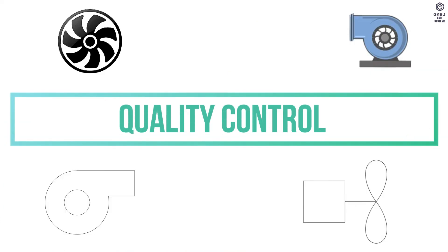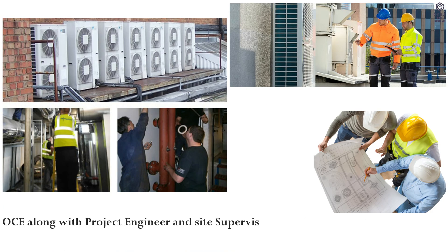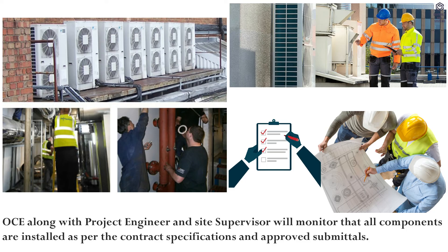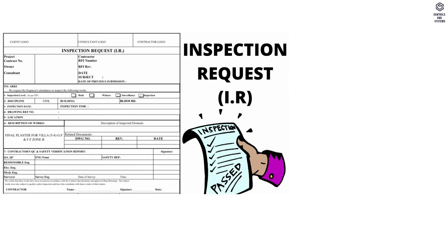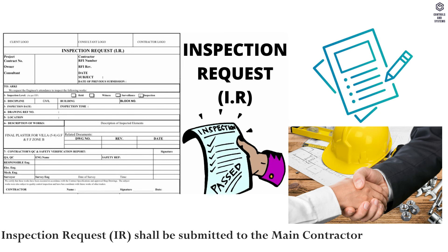Quality control: QC along with project engineer and site supervisor will monitor that all components are installed as per the contract specifications and approved submittals. An inspection request (IR) shall be submitted to the main contractor or consultant.